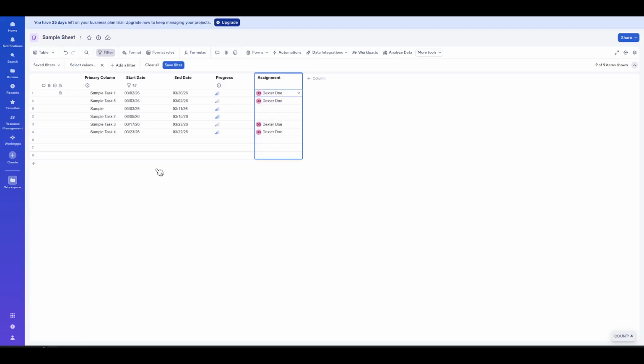As soon as you pick a filter, Smartsheet narrows your view to show only rows that match your criteria. Nothing is deleted. The other rows are simply hidden until you adjust the filter again. If the results aren't quite right, revisit the same column header, right-click, and tweak the condition to refine what appears.